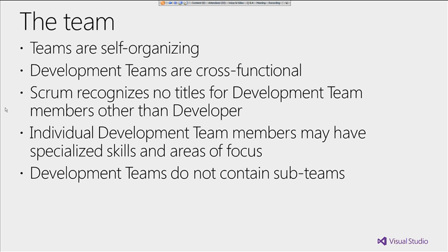The other characteristic is that teams do not contain subteams, meaning that it's usually a flat hierarchy of small teams with peer team members, a team of 5, 6, 7, sometimes bigger, up to 10. But if it becomes that big, 15 or 20, it's usually time to break the team into two and focus those two teams working in parallel on different feature sets. I won't go into how to scale up Scrum in this talk, but the main idea continues that teams do not contain subteams.